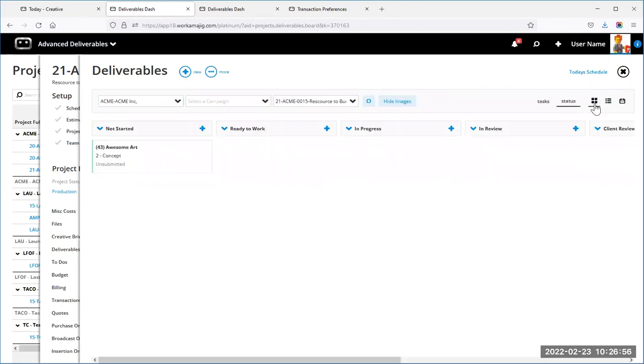You do have this card view, and you can just say, hey, let me move it through the statuses. I don't want it to change what task it's on, but hey, this is in progress now, and that can be independent of the task it's on. So you can just drag things through here and say, hey, move it to copy, move it to design. And that will just update which task it's assigned to. And again, today creatives would change who would see it based on those tasks.